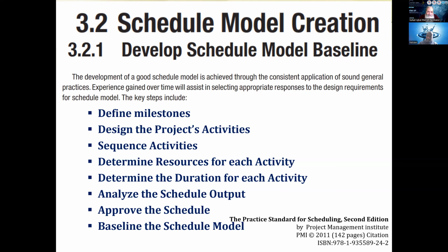And second important thing about this is these events and milestones do not have absolutely any duration, no duration at all. They are always zero duration because they are instances, they are moments in time. This is a moment in time when this activity finishes or starts, when this phase finishes or starts.